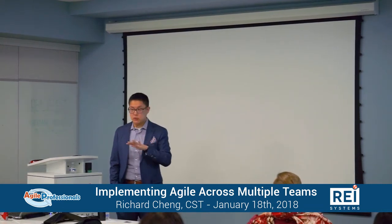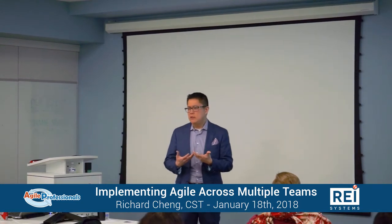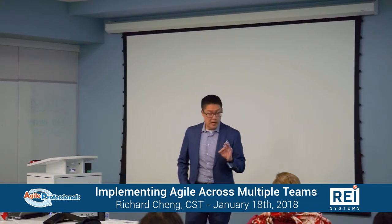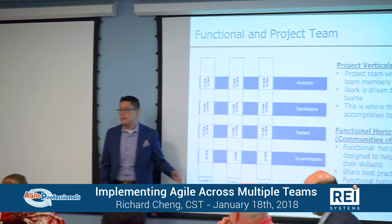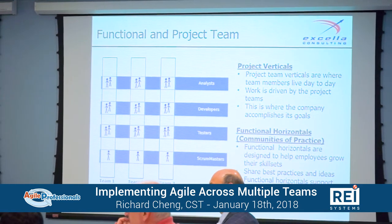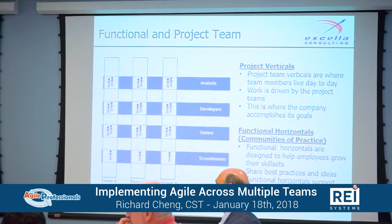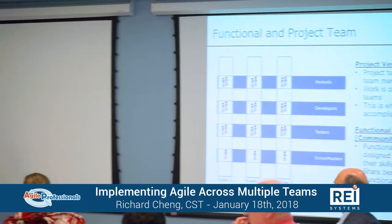in the Scrum Master community of practice, we created what we called Scrum norms. The basic concept is, hey, if you're at the Motley Fool, don't reinvent the wheel. If you do Scrum at the Motley Fool, here are the Scrum norms. But every team is allowed to have their own Scrum pilots, which means a deviation from the norm. The Scrum Master community of practice periodically reviewed all the pilots, and the pilots we liked a lot, we'd incorporate as a new norm. Some pilots we thought were fine, but we wouldn't force everyone to do them. Any team that wants to adopt one can, but you don't have to. It's an optional pilot, an optional norm.